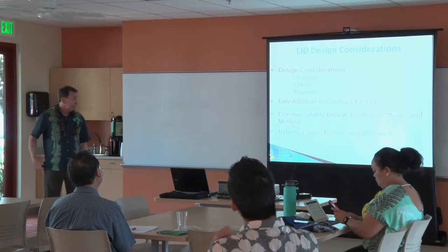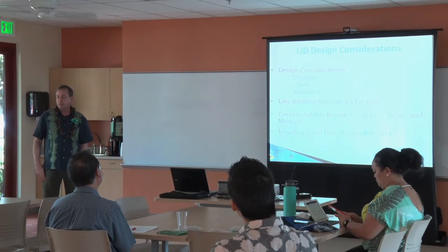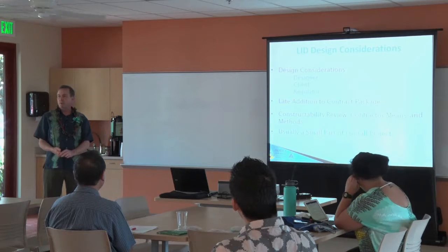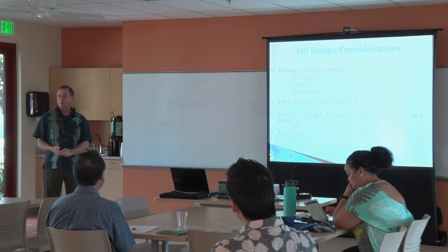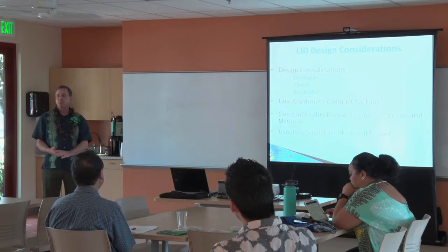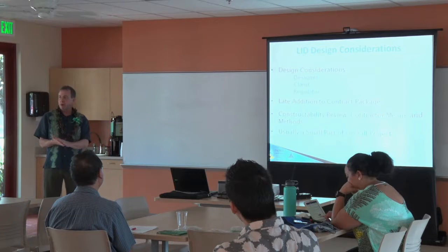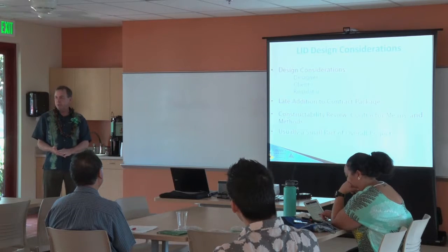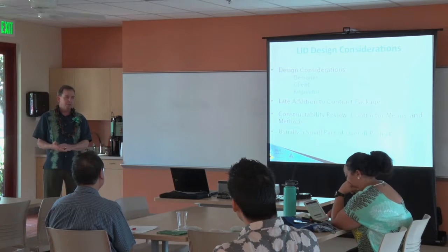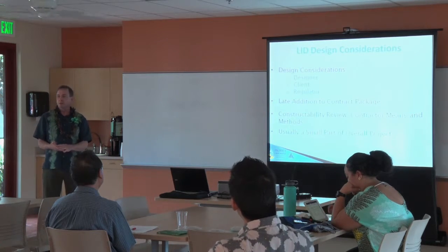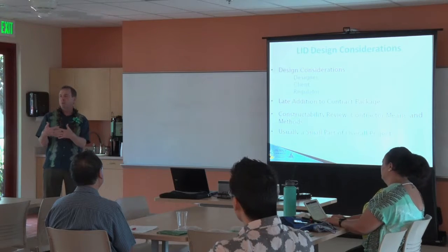I mentioned earlier the late addition to the contract package. This has been a problem with stormwater of all types, LID and traditional stormwater treatment. We have a requirement that it has to be in the project. It gets overlooked, forgotten, maybe not enough attention paid to it up front. We get to the 90% design and somebody finally says, oh, wait, we've got to have stormwater treatment, so we throw something in there so that it's not really an integrated part of the contract package.